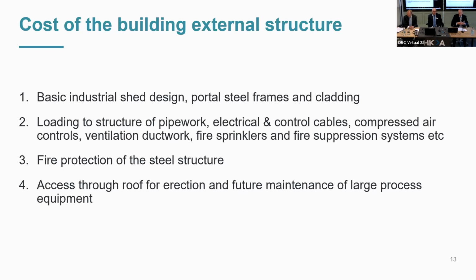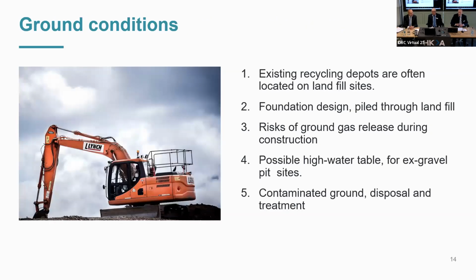And therefore, normally you will need access through the roof of the building for crane access to take out or to maneuver large pieces of equipment. So this is an issue which occurred on one of my projects.